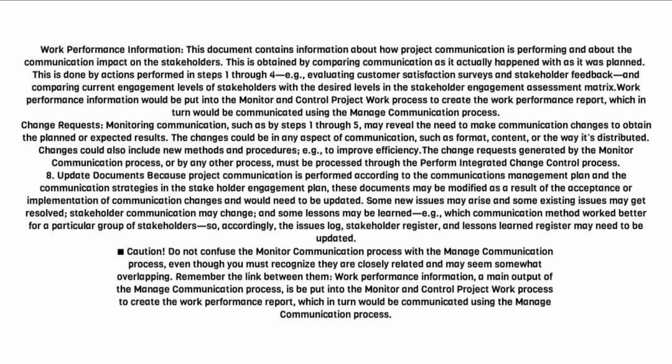Change requests. Monitoring communication, such as by steps 1 through 5, may reveal the need to make communication changes to obtain the planned or expected results. The changes could be in any aspect of communication, such as format, content, or the way it's distributed. Changes could also include new methods and procedures, e.g., to improve efficiency. The change requests generated by the monitor communication process, or by any other process, must be processed through the Perform Integrated Change Control process.